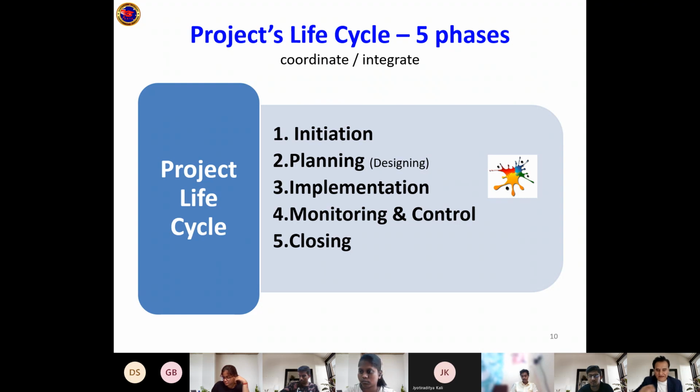When the sponsor signs with a date, that date is the formal closing of the project. Clear? So Deepak, your answer will be, sir, when I finally make a final report and get it signed by my sponsor, which is an approval for formally closing, that is the date for my formal closing of the project.